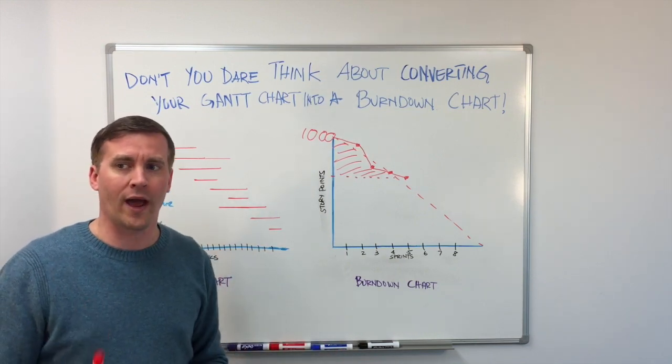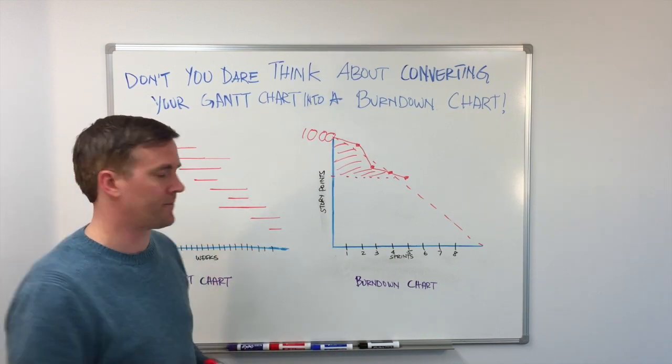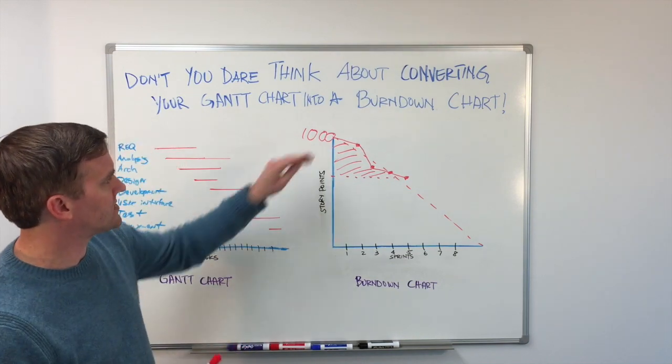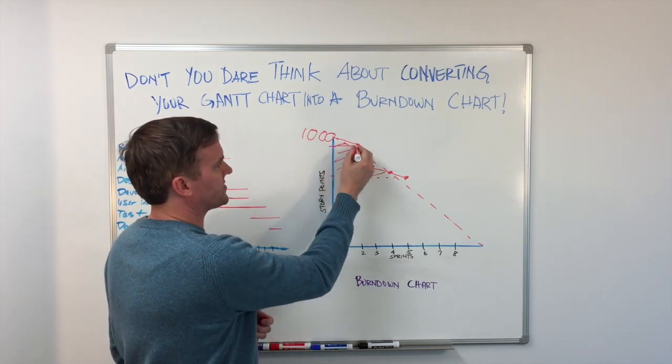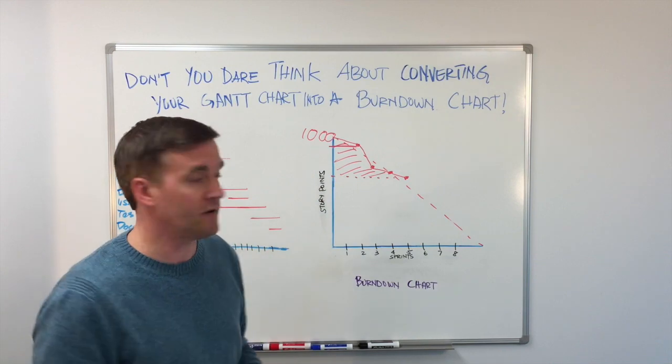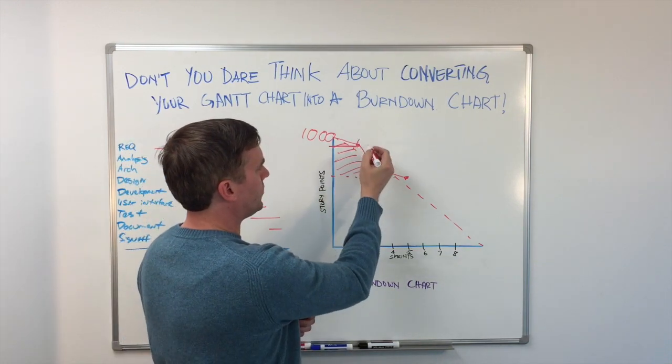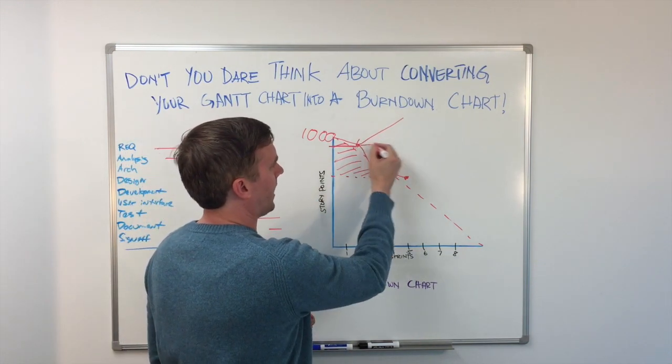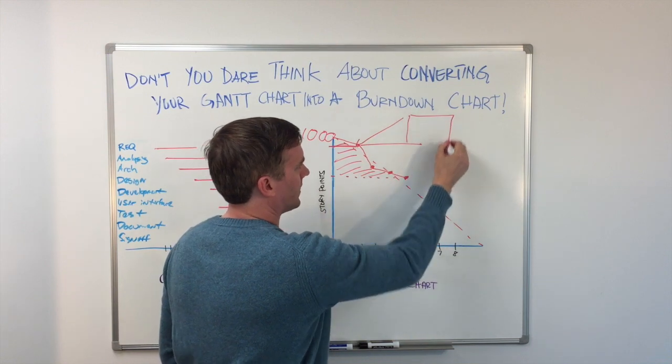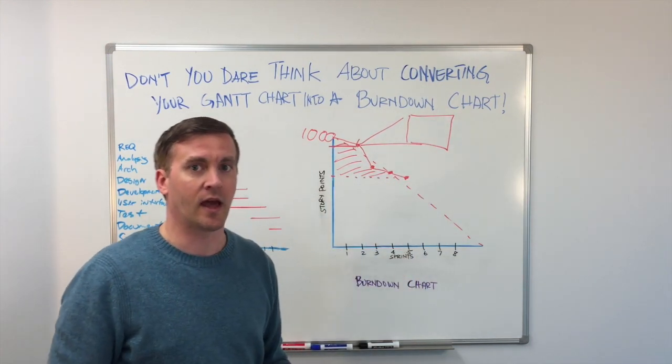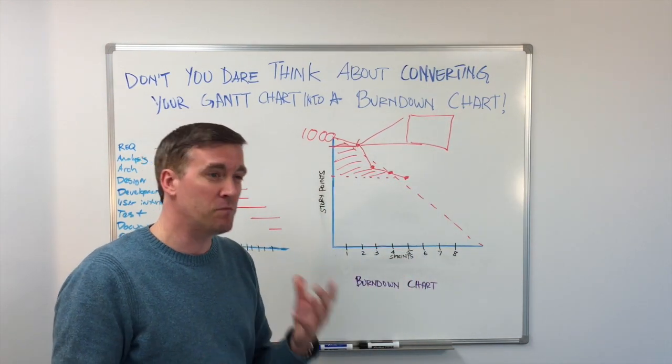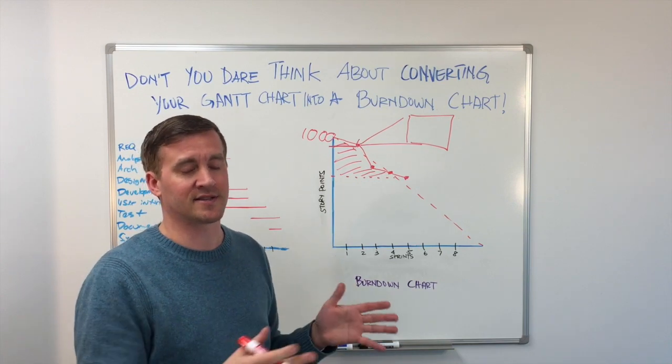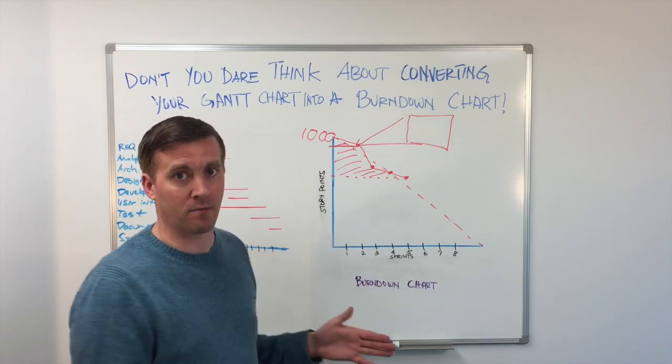Now there is one way where you can make the two work together, and that would be if you consider each one of these sprints a miniature project in and of itself. So this little tiny two-week chunk of work, if you expanded it out, could look something like a mini project. And in a mini project, you might have a linear set of steps that could map out much like a Gantt chart.